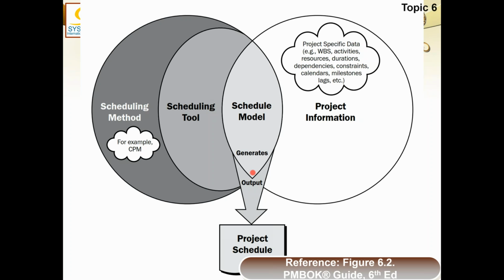At that point, if the schedule is baselined, we will call it 1.0. Then when we unbaseline it again, unfreeze it again, it will start again with 1.001, 1.002, and so on and so forth, until we reach a point where it is baselined and we say now it is 2.0.